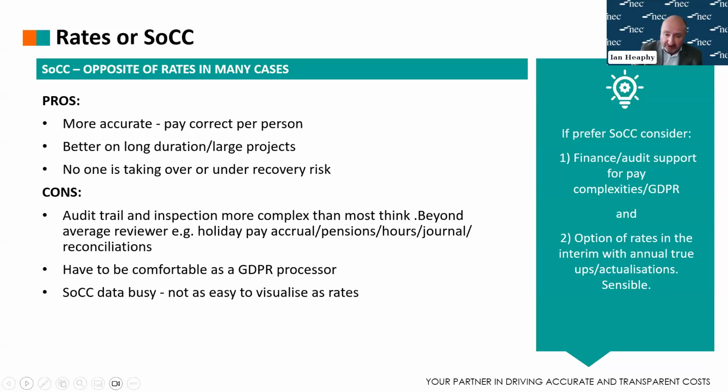And that may then sort of conflict with the target cost mechanism around the incentive to reduce costs to create gain, to create benefit, when actually there could be an adverse driver of the more hours we burn, the more we earn, and that could actually overcome or counter any overspends elsewhere through a pain share, gain share mechanism. Yeah, no, I totally agree, and they're not as simple as people think, but in the right environment, they do work well.